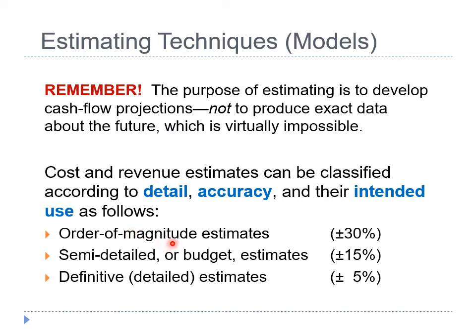Order of magnitude estimates are used in the planning and initial evaluation stage of a project. They are used in selecting the feasible alternatives for the study. They typically provide accuracy in the range of ±30% and are developed through semi-formal means such as conferences, questionnaires, and generalized equations applied at level 2 or level 1 of the work breakdown structure.